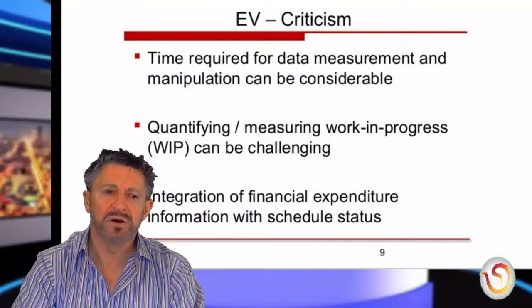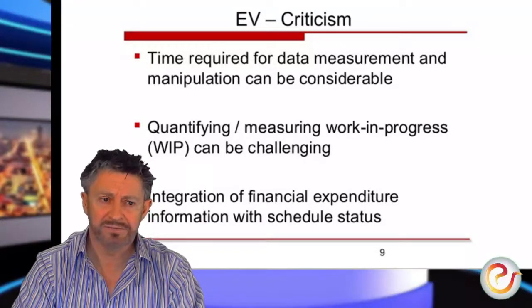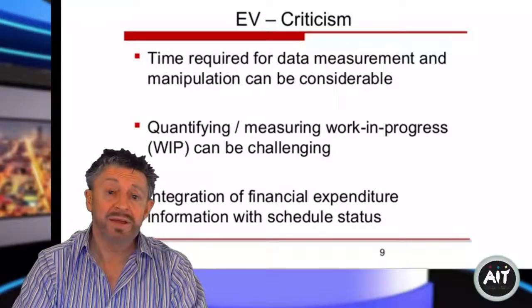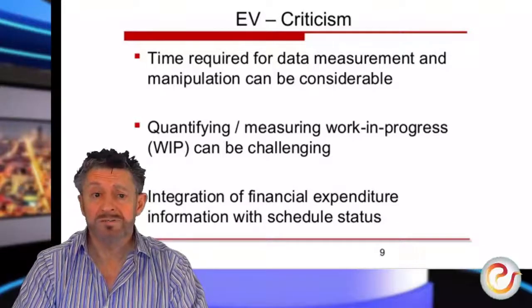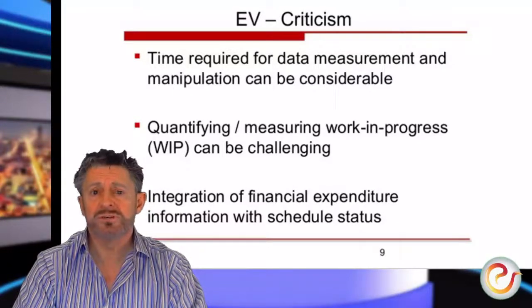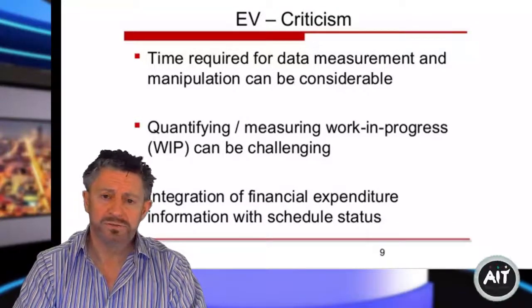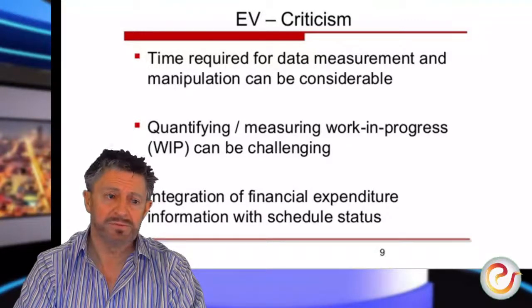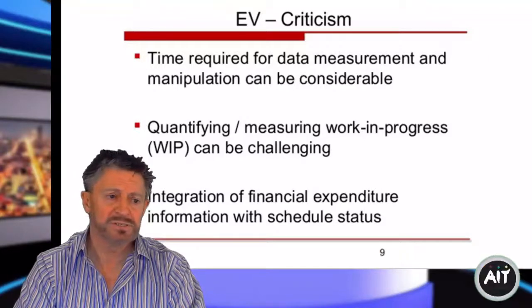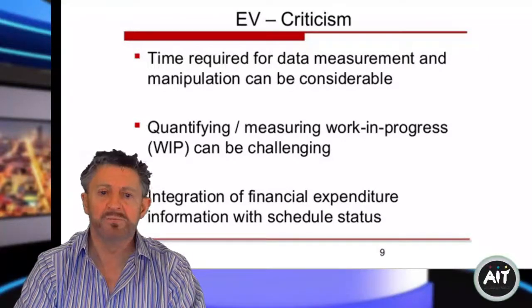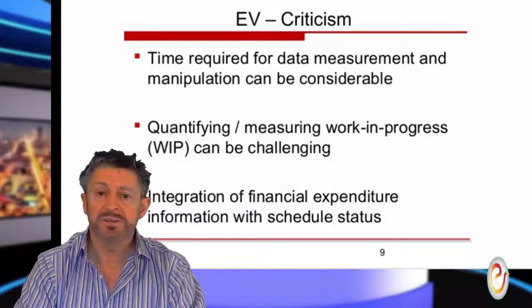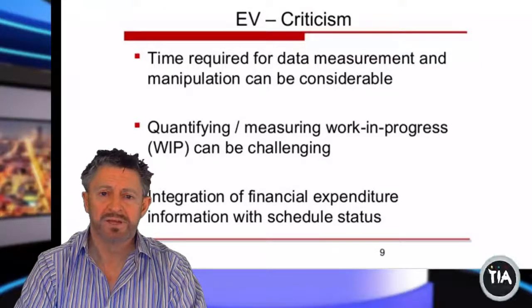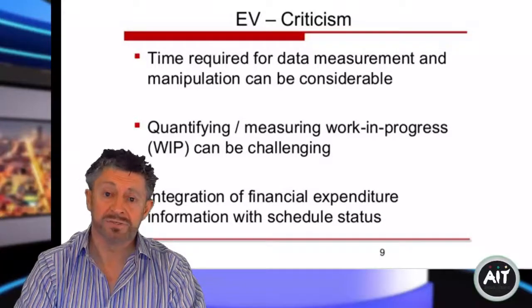You might have to look for alternative ways of getting the data. But that's the big challenge. So you need, and again, all of this, for example, to produce earned values, we used to use our own time recording systems and feed them into another system, a project management system, and then we might output those as CSV files from the project management system into Excel, and then produce our figures.